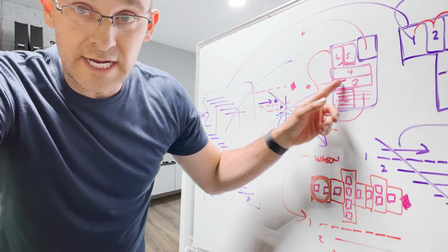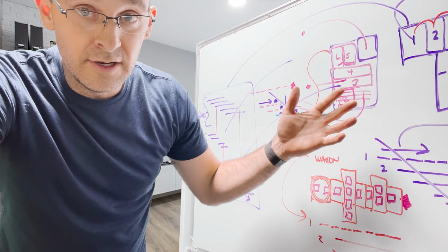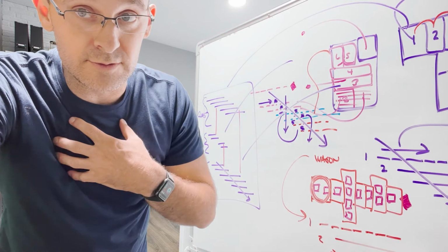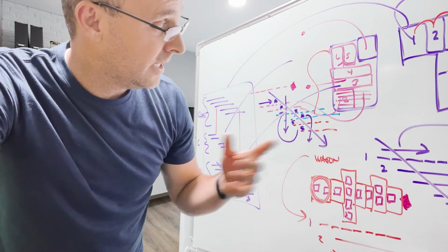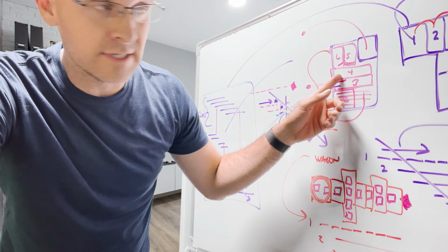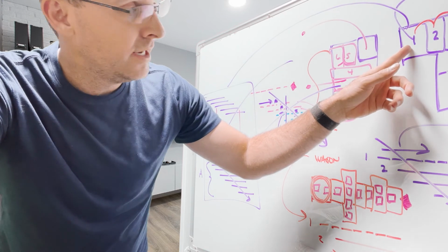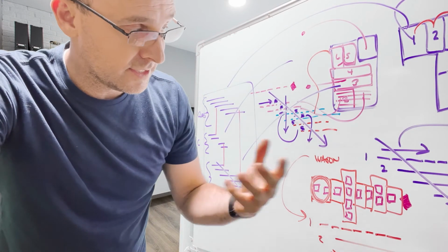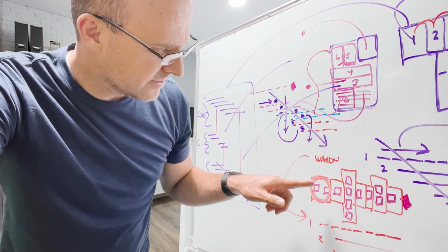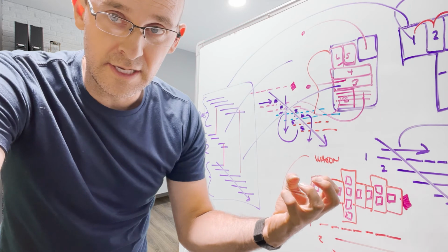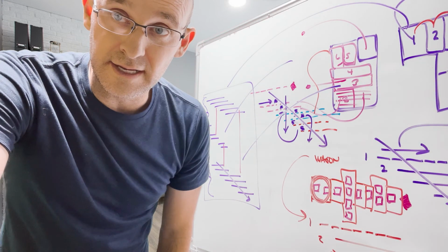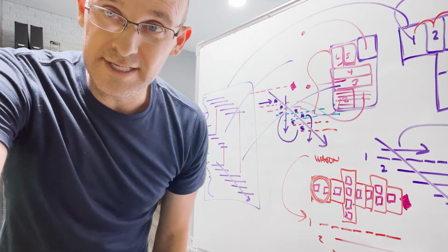So whether you turn this into a takt plan from your pull plans, and then from the takt plan do your look aheads and your weekly work plans, which is what I recommend, that's the system I use. If you don't do that, just show on your visual maps that this is managed in Last Planner, this is managed in Takt, and use the two systems. But essentially there is no need, because all a takt train is a combination and the packaging into takt wagons of the sequences in a pull plan, and that's called a takt train.